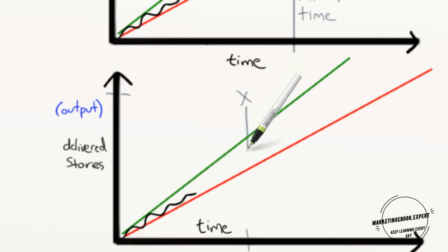Followed by, here's how much we can get done by Christmas, or here's how much more time we would need to get everything done. It's generally better to reduce scope than to extend time, because if we reduce scope first, we still have the option to extend the time later and add the rest of the stories. Vice versa doesn't work, because darn it, we can't turn the clock backwards. You know, time is rather annoying that way, isn't it? So Pat puts it this way, we could deliver something here and the rest later, or we could deliver nothing here and the rest later.